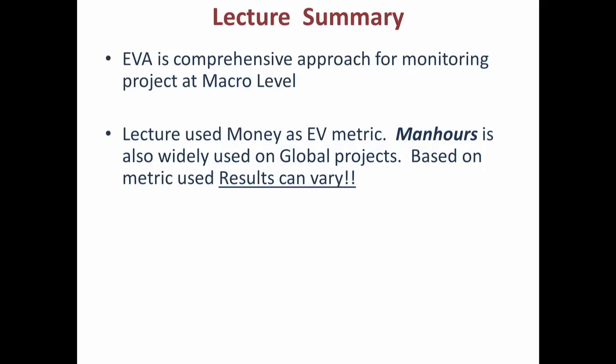Measuring progress based on a money metric versus a man-hour metric can give different results — for example, 40% complete based on money but 60% based on man-hours. This is a subjective element, and a good planning team should have judgment on what is the appropriate metric for their kind of work and project.